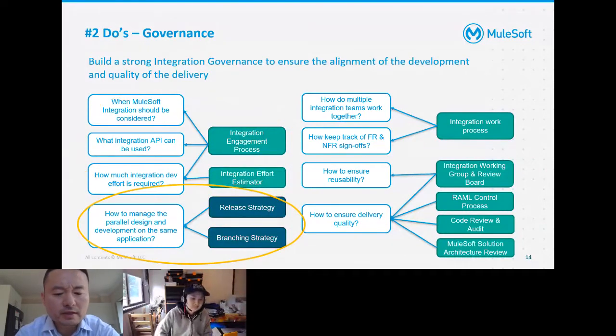At one period of time, we had 5 different work streams, all delivering the integration APIs. Coordination of deployment from each project was a nightmare. You have your API running in the SIT environment being tested, and suddenly it got restarted because of the deployment from another project. And you have your feature waiting on testing sign-off, and the application has to be changed by another team. So our solution is to make integration a shared resource and have a dedicated integration release, daily, weekly, or fortnightly.